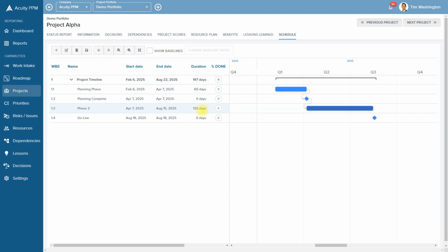And so in this case, maybe we want to get exact to our original duration, and you'd have to then massage the numbers. But in this case, I'm comfortable with this. This is 190 days, and I'm going to draw another finish to start with the go live date. And at this point, let's just save for the first time.